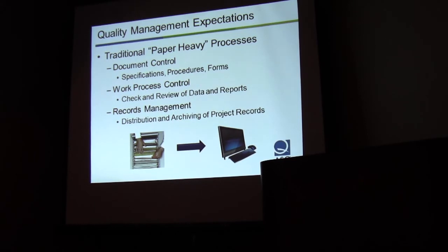So what are our specific processes that we have that are paper heavy? Well, one, we've got all the specifications that we have to follow. We've got all of the procedures that we have to have in place. Procedures that say, if you're going to go out and look at some rebar and determine that is acceptable or not acceptable, what's the process that you have to follow? The same with if you're going to go out and do a compaction test. What do you have to do to make sure that the soil has met its compaction?